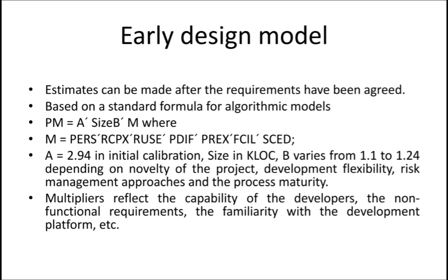Estimates can be made after the requirements have been agreed. Here requirements are there for you. Once the requirements are there, you can go for the early design model. So here the formula is PM = A × Size^B × M, where M = PERS × RCPX × RUSE × PDIF × PREX × FCIL × SCED. These are the matrices. I will explain what these things are. These are all the different matrices, right?